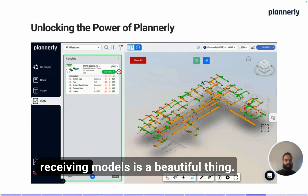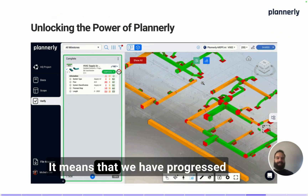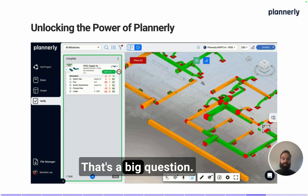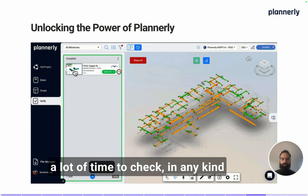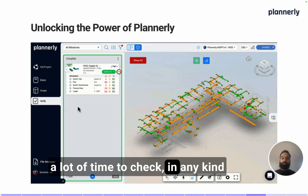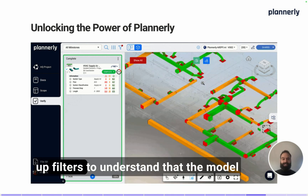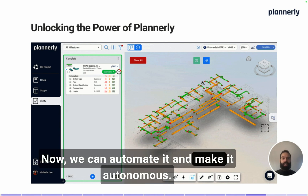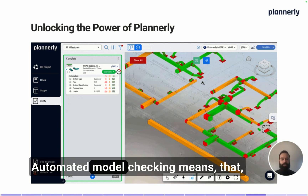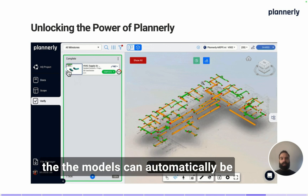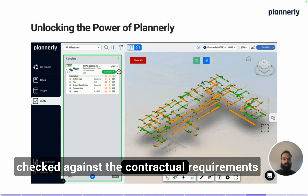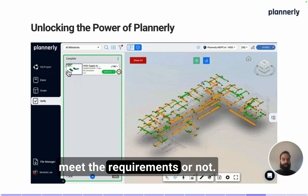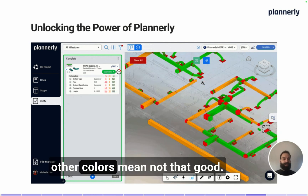Last but not least, receiving models is a beautiful thing — it means we have progress on the project — but are those models aligned with your plan? That's a big question. Traditionally, it used to take a lot of time to check in any application, setting up rule sets and filters to verify that the model meets requirements. Now we can automate it. Automated model checking means models can automatically be checked against contractual requirements, and with a simple visual feedback you understand if they meet requirements or not: green means good, other colors mean not so good.